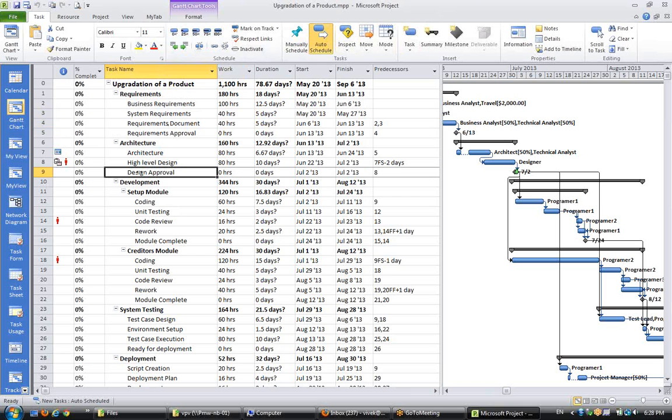So you say we have started, we are already doing, you say okay, I made it 25%. You say you have completed half, make it 50%. You may be reaching closer, make it 75%.